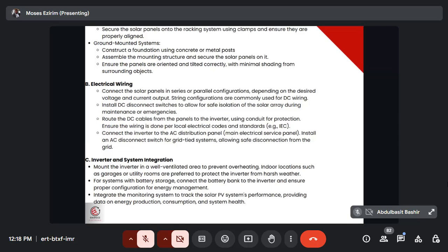All right. In fact, we have a coordinate machine that, once it gets to that coordinate, you already know this is the coordinate where it needs to drill in the pile. So it does that, and I'm good. That is what we call RAM, ramming mounting structure. That's what we call it. Don't worry, in the course of it, you get to know everything.